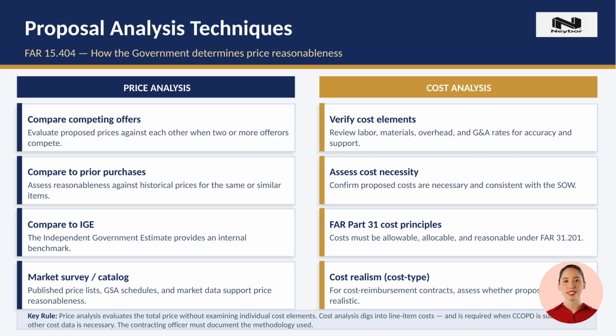Cost analysis is a deeper dive. It breaks down individual cost elements and asks, are these costs necessary, reasonable, and properly calculated? Cost analysis is required when certified cost or pricing data is submitted, or when price analysis alone won't establish reasonableness. For cost reimbursement contracts, there's a special form of cost analysis called cost realism. The agency assesses whether the offeror's proposed costs are realistic for the work. An unrealistically low-cost proposal may signal either an unclear understanding of the work or a plan to lowball and absorb overruns.